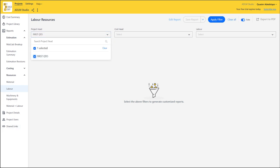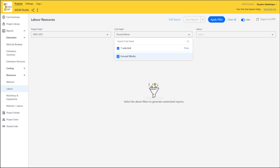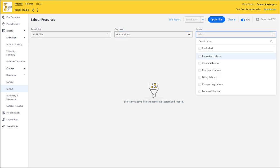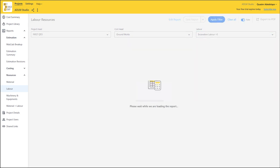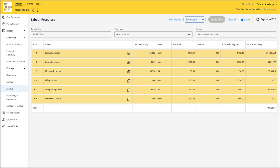This is our project title. Then the summary is groundworks. You can just select all of the labour categories, just like we did for materials, then apply filter. With this software you will get all of the labour that you would be making use of — your labour for excavation. This is the volume of work to be done in cubic meters, this is your rate per cubic meter, and this is the summary.